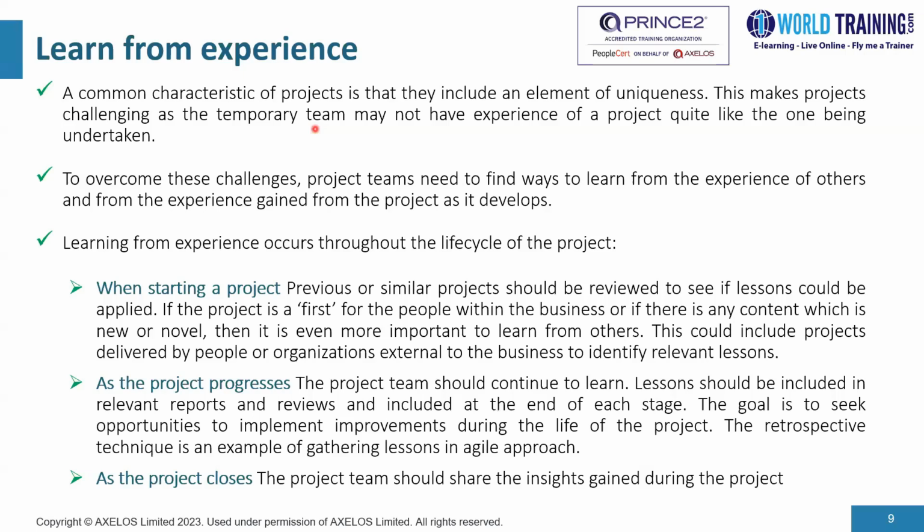Now, learning happens throughout the life cycle of the project. It happens at the start, during the project, and as the project closes. Now, when we start the project, we could look into previous or similar projects. We could review them to see if lessons could be applied. If the project is the first for the people within the business, or if there is any content which is new or novel, then it is even more important to learn from others. This could include projects delivered by people or organizations external to the business to identify relevant lessons.